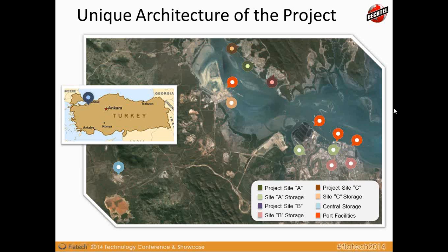So the goals in this really were to maintain the location of materials as they move through the localized supply chain that you see there, and also to shorten the cycle time and reduce the cost for the collection and transfer of materials by using fewer resources. Obviously the less manual labor we have in that and the better the automation, the better for all concerned.